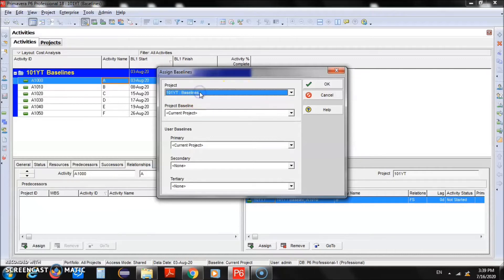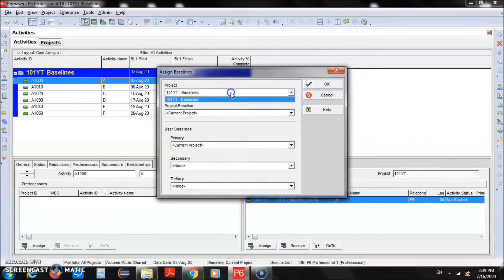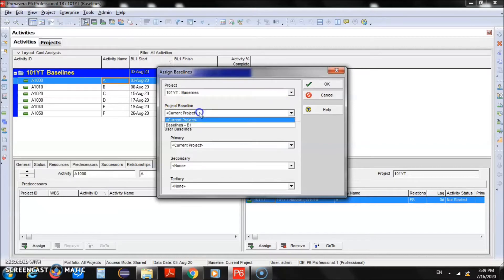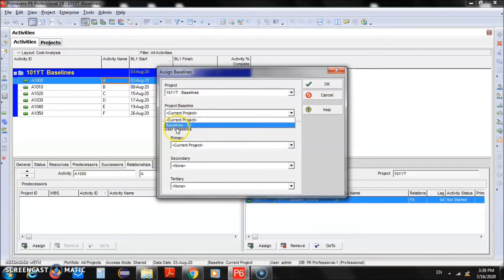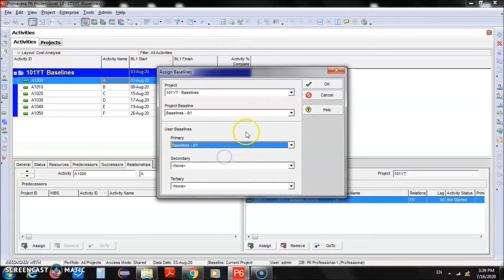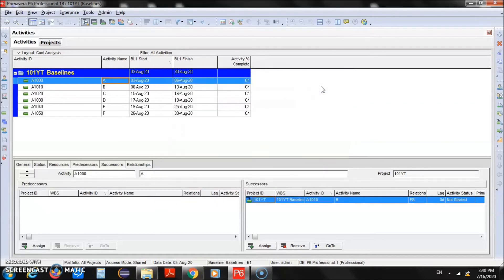Here we have the current project named 'baselines'. For this current project we will link baseline B1. The baseline name is typically the project name followed by B1, B2, B3, and so on. We'll select B1 as the baseline to connect, and in the User Baselines section select B1 as Primary as well. The connection has been established — click OK.